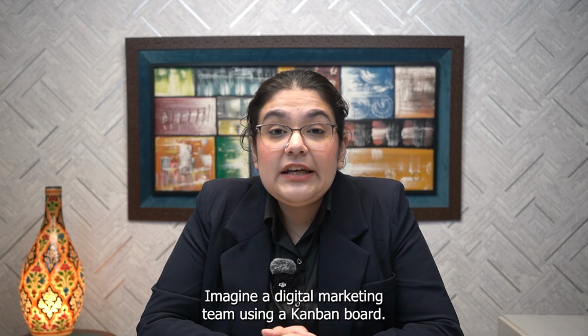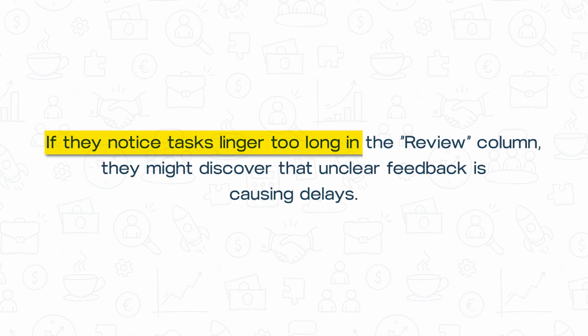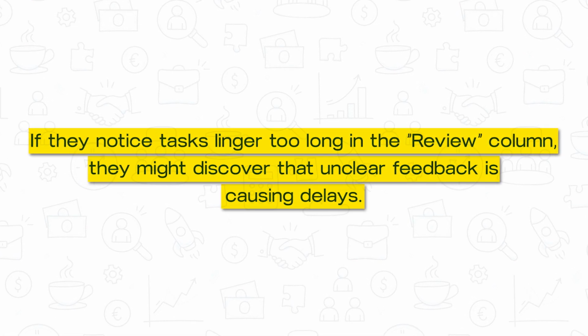Imagine a digital marketing team using a Kanban board. If they notice tasks linger too long in the review column, they might discover that unclear feedback is causing delays.